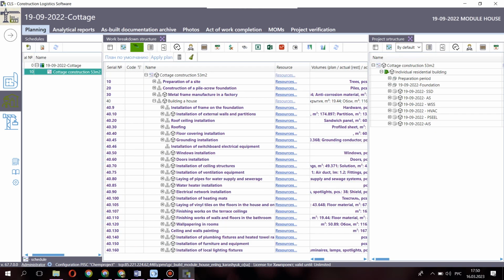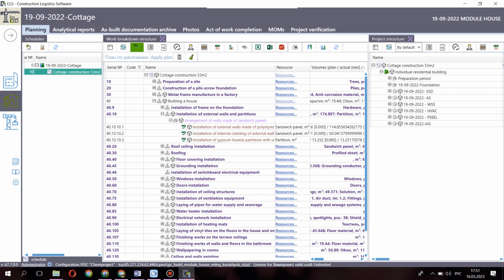The lower level of planning is necessary for work organization on a specific division. It can be used to clarify the period of work on this division. At the top level of planning, links can only be formed between divisions and cannot be established between a division and a position inside another division, or between a division and a line, the name of a group of divisions.